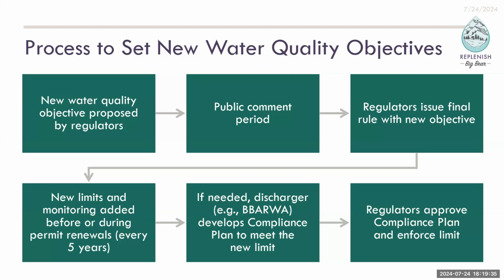So should DWP move forward with a project to recharge in Sand Canyon, that would require a full brand new set of permits complying with whatever regulations are in place at that time. So really, we've got a two-step process here in which Barstow is required to meet a certain standard, and then DWP, if they so desire to move forward with that project, would again have to meet that standard of recharging Sand Canyon. They have a whole other set of requirements, and Lane knows more about it than I do, for recharging in Sand Canyon.